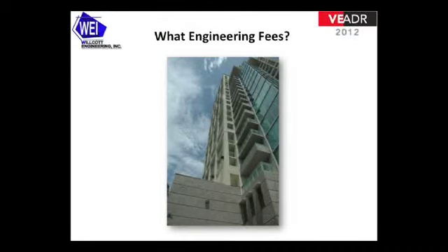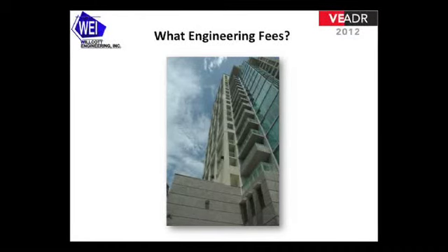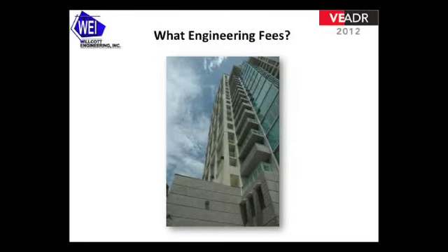How is it doing today? At present, there's still 3 leaks that are recurrent. There are ongoing professional fees associated with observing those opened up areas and directing repair. The tie-in of the selective waterproofing is critical to the success of those repairs. And if you have field involvement during it, you have a way to be able to stay in front of what those issues are.